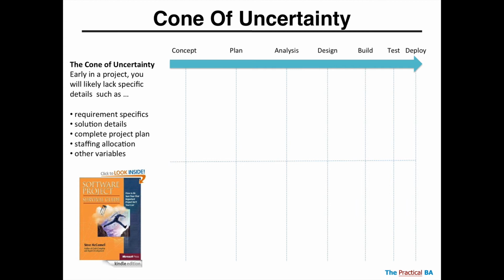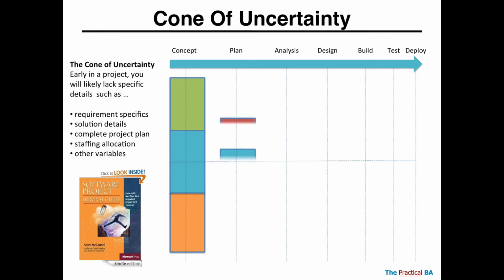At the top, you can see we have our different phases. And at the concept phase, the things that we're not sure about could be in big groups, but overall, it's going to have X amount of size. Now, as we do those justification forms and go through those processes to go through the phase gate, what happens is we learn more about our endeavor and our uncertainty changes. In most cases, it will shrink.